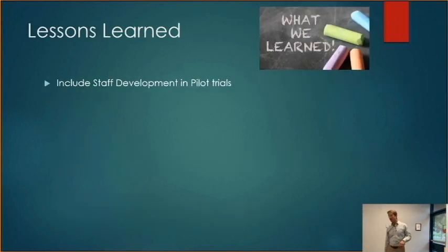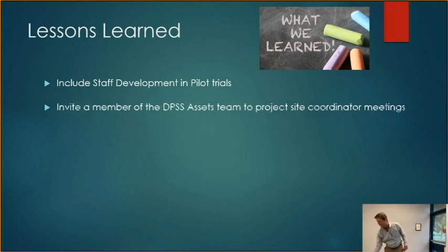Okay, what did we learn along the way? We learned a couple of things. One, always include staff development in pilot trials, right? Because they care about documenting this stuff and they give great feedback. So that was my bad for not including them in the pilot, because we did the pilot at Kidd Street and at the two other streets, but no staff development. My bad. I learned.